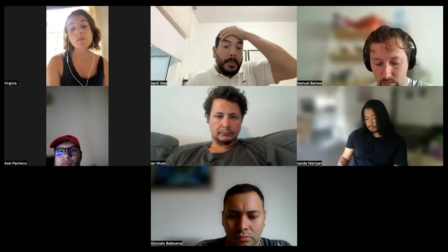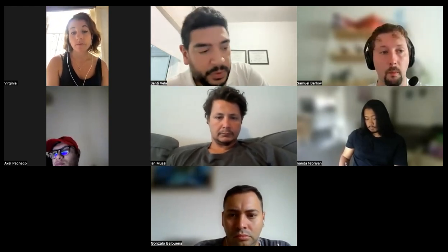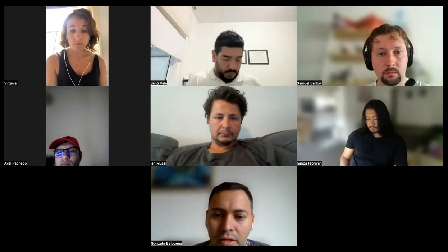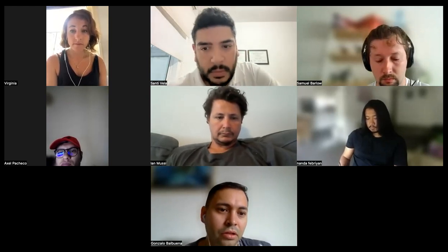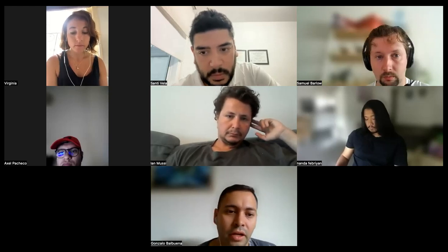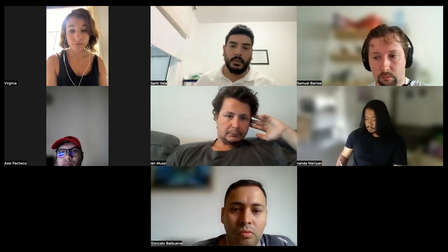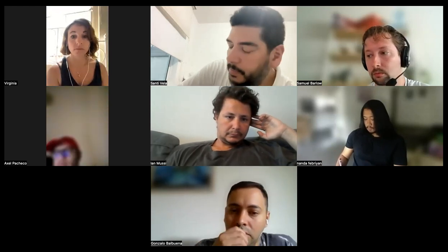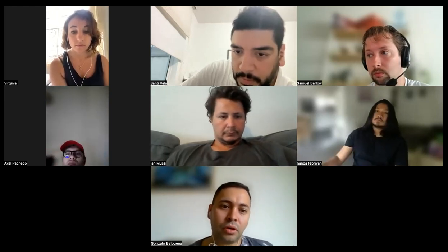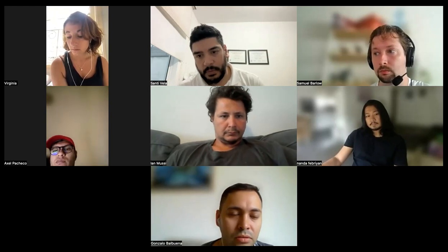All right, so Gonzalo, how do we improve the quality of a project? What can we do? So first of all, we have to identify what's happening in the activity or the deliverables where we are having some issues. Go to the lessons learned register to identify what was wrong before compared to what is wrong now. So we can know what we have to do. If we have changed something, we will have to apply for a change request to the project sponsor, asking for more time, budget, resources.